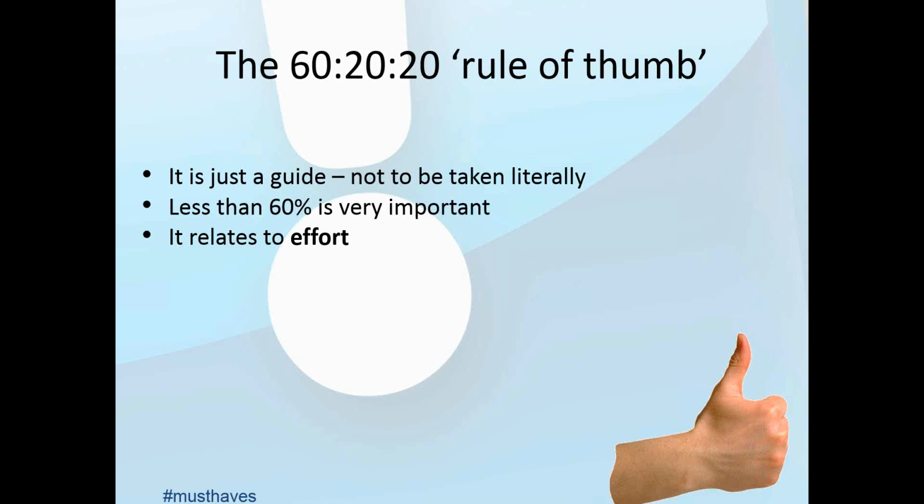So that 60 is a very important figure, because this is giving you what's called the minimum usable subset, and that's not a typo on there. The last T in subset makes it spell the word must, and this is what you absolutely have to have.